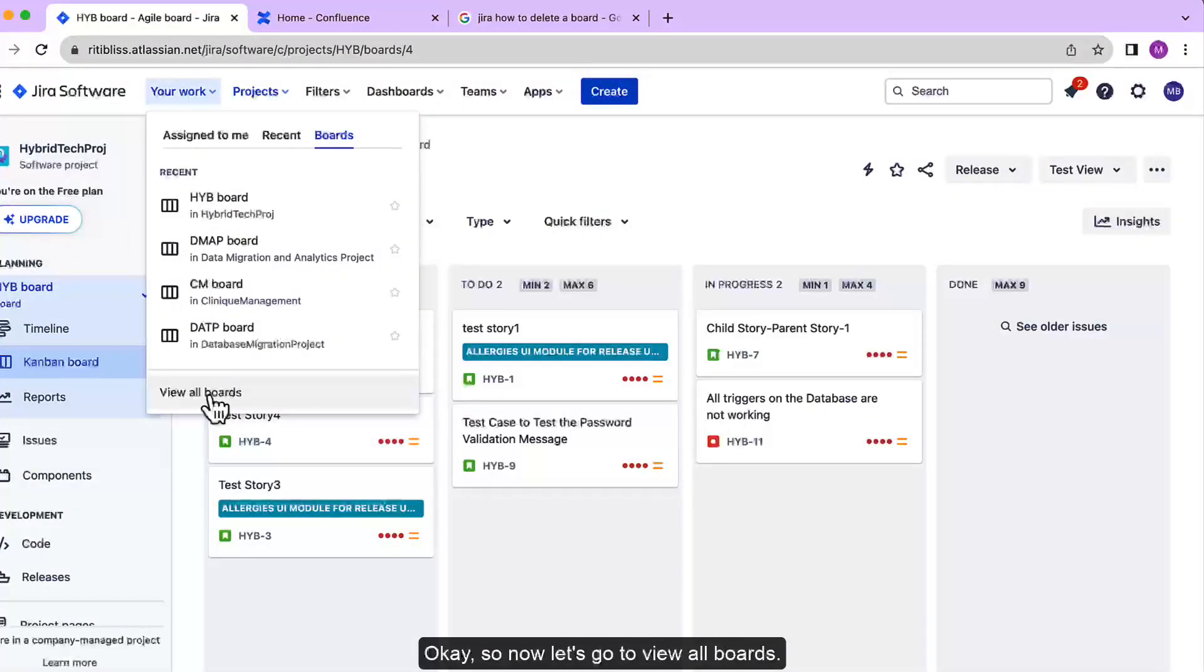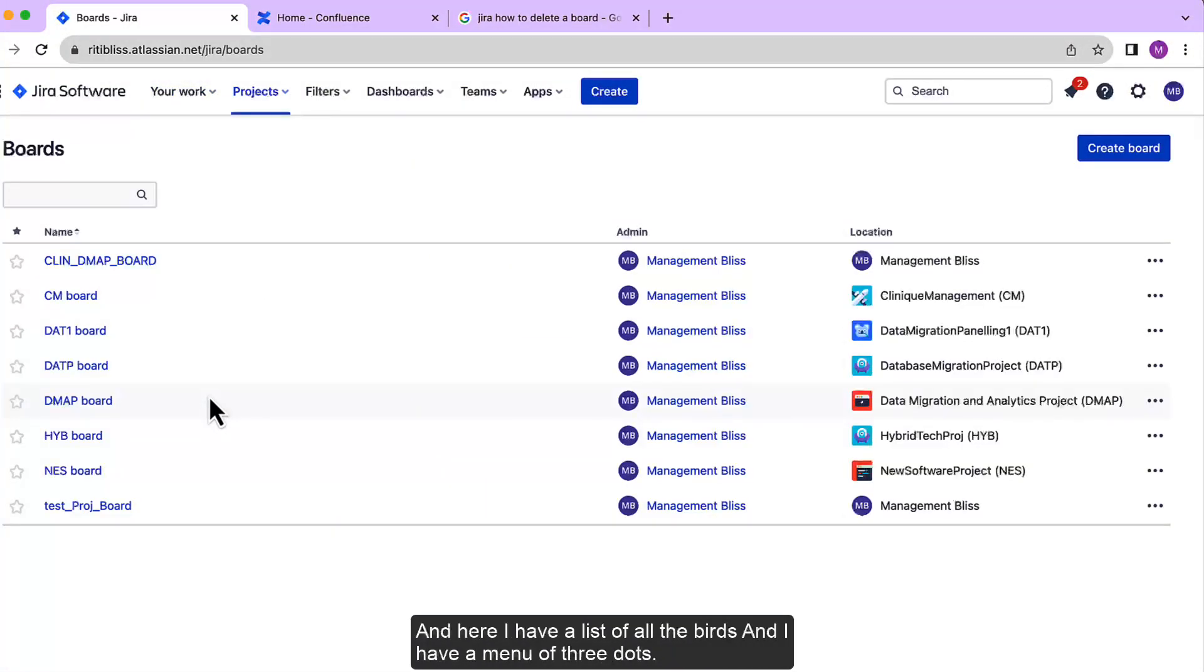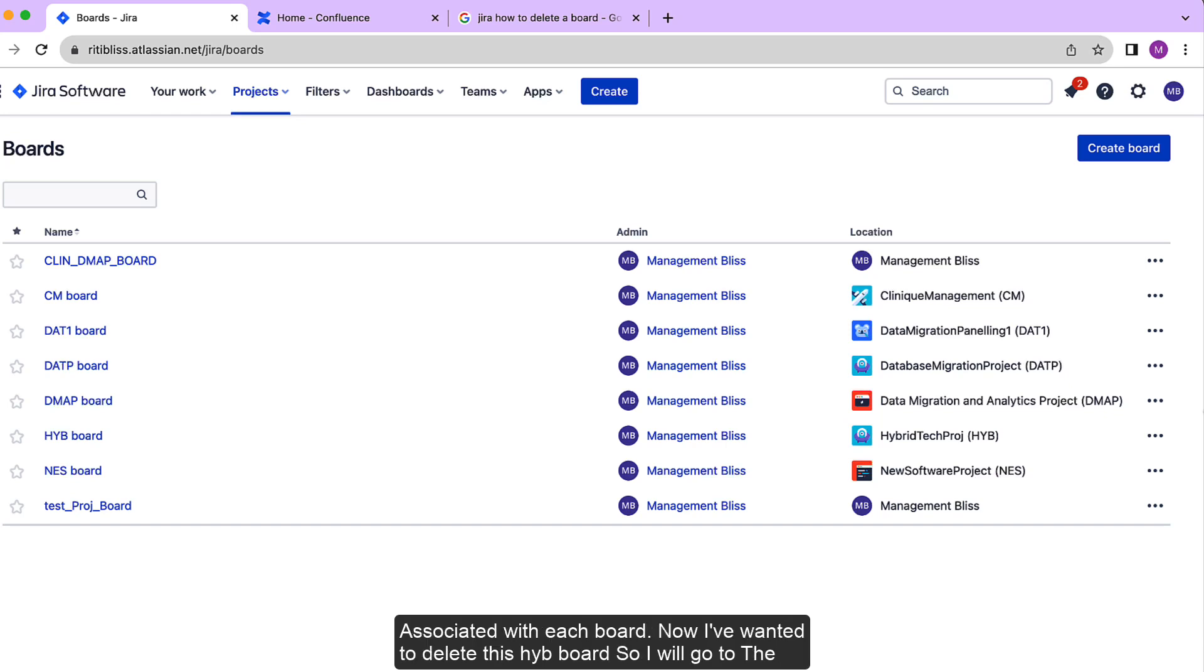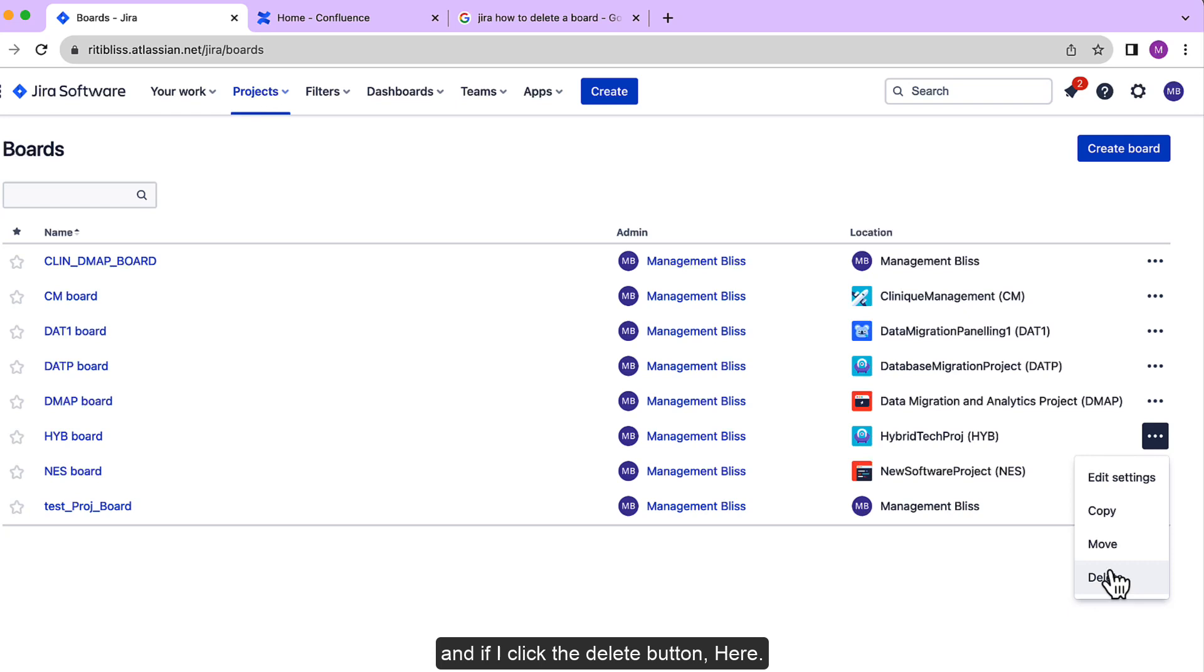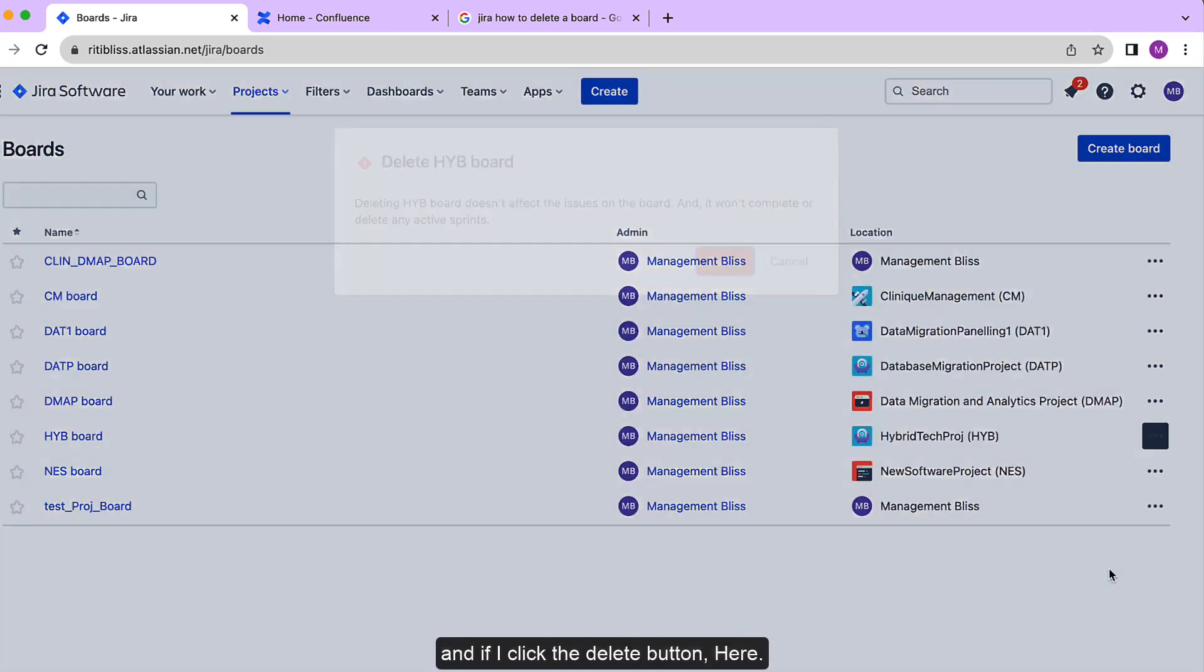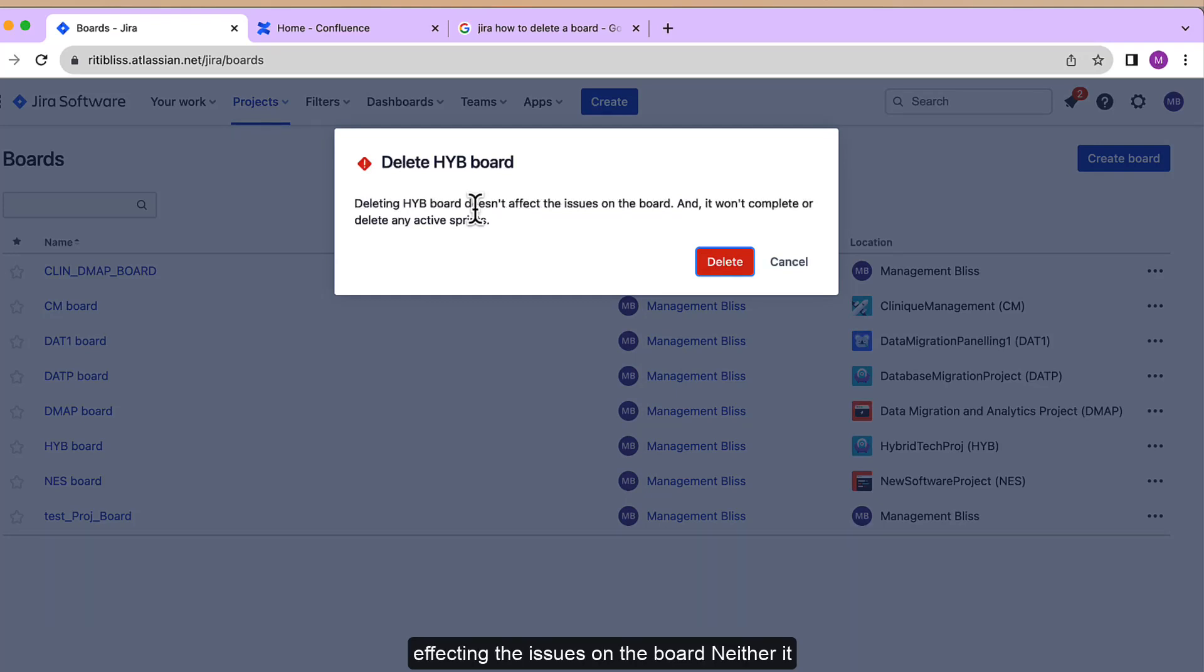Okay, so now let's go to View All Boards. Here I have a list of all the boards with a menu of three dots associated with each board. Now I want to delete this HYB board, so I will go to the three-dot menu associated with this board and click it. If I click the delete button, it will give us a warning panel which says that deleting this board will not affect the issues on the board.